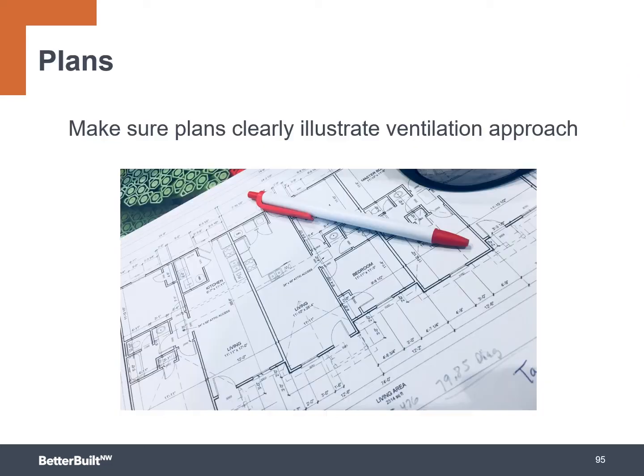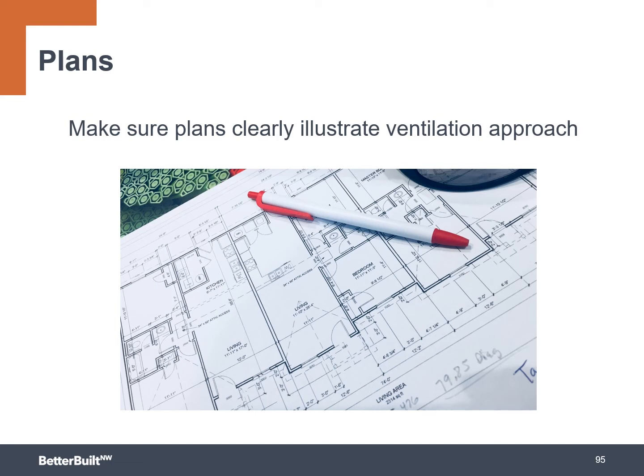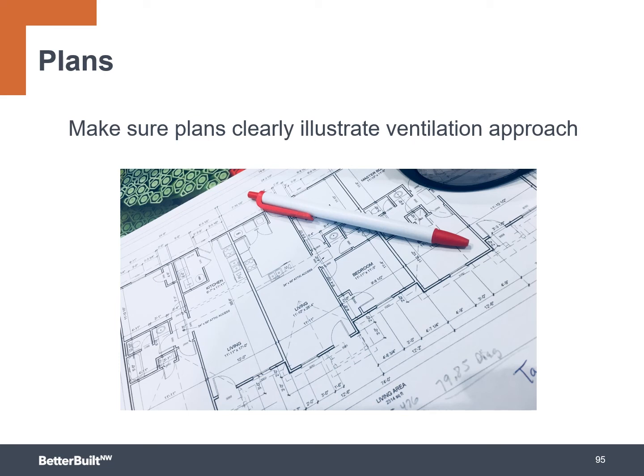As we get near the end here, it's really important not just to make some of these decisions for yourself and to be thinking about how this impacts your ability to sell and the experience of your future homebuyers, but we also want to think about making this work in just a basic effective way. How do you fit this into your sequencing and how do you make sure your trades get used to this? So one of the earliest steps you can do is make sure that your plans clearly illustrate your ventilation approach as well as document what your additional code credits are going to be. The better you can integrate all of this into your plans, the easier it will be to reference in scopes of work at pre-construction meetings or in submittals to your jurisdiction.